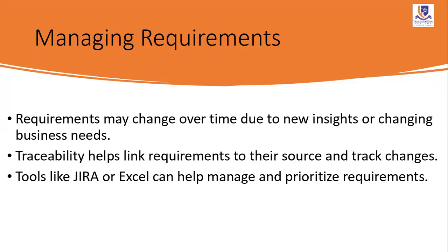This was one of my early stages. It wasn't really documented, and that documentation was not properly verified by my end and also validated by the stakeholder. So when it changed, there was a lot of back and forth. It occurred to me that some of these steps shouldn't be taken out of the job that you're doing.